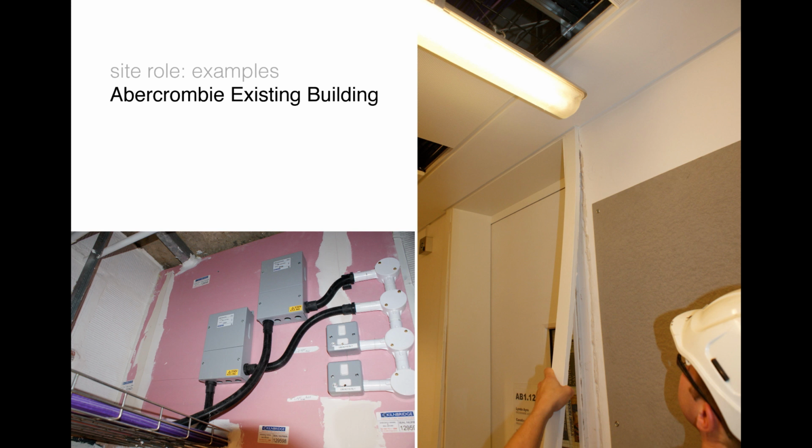So the contractor ended up taking all the frames off of all the doors, opening it all back up, re-fire stopping it all, opening all the ceilings up, and we ended up having to inspect every door to ensure that all the fire stopping was in place. So it's one of those slightly less glamorous tasks, but from a life safety point of view, it's absolutely vital to ensure it's all properly done. That's just a contractor trying to rush it, really.